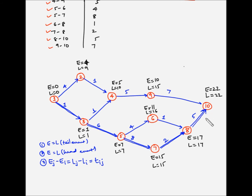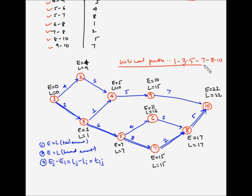Our critical path is 1 → 3 → 5 → 7 → 8 → 10. The latest and earliest occurrence time of event 10 is the 22nd week, so the duration of the project is 22 weeks, which is also the duration of the critical path. Verification: 1 plus 6 equals 7, plus 8 equals 15, plus 2 equals 17, plus 5 equals 22. So the duration of the project is 22 weeks.